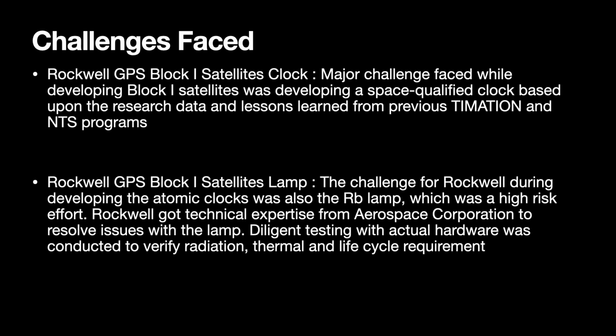The second challenge for Rockwell during developing the atomic clocks was the rubidium lamp, which was a high risk effort. Rockwell got technical expertise from Aerospace Corporation to resolve issues with the lamp. Diligent testing with actual hardware was conducted to verify radiation, thermal, and life cycle requirements.